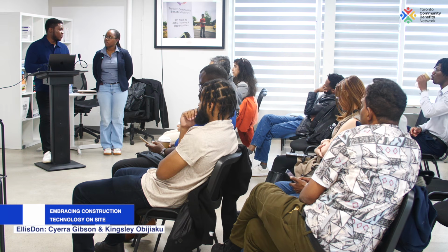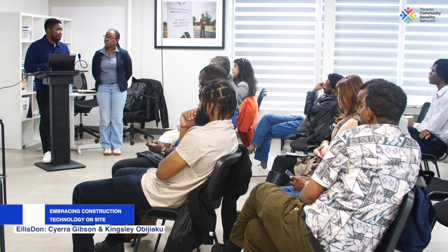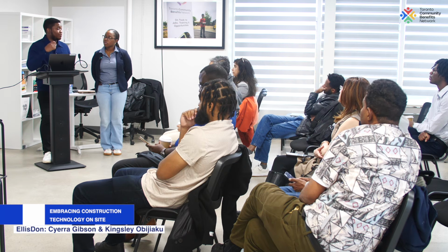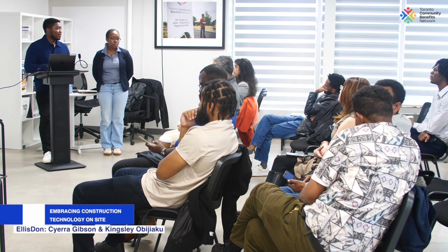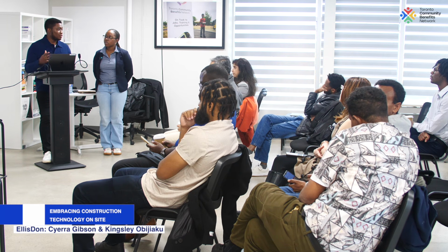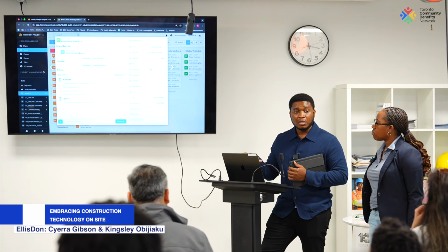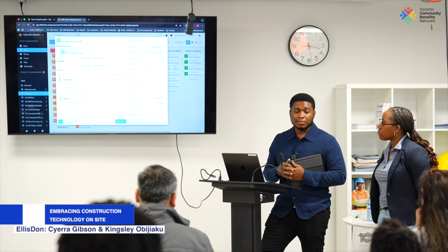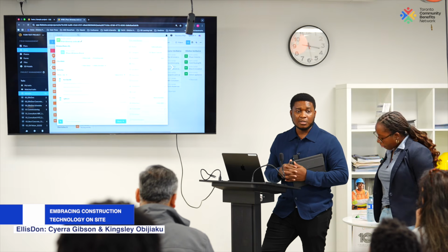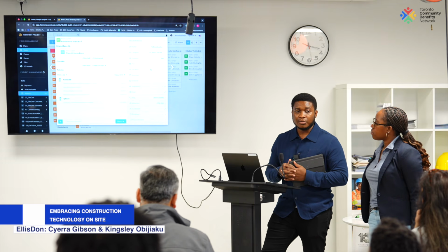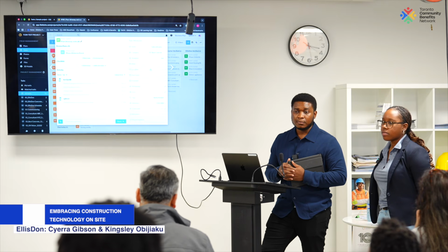And it's very important for us when we're finishing the job to also be able to generate as-built drawings to hand over to the owner. So that's what this tool can be used for. Because all the changes from the inception of the project are monitored here. So that's something that we need to be able to give the owner at the end of the job, a very accurate description of the project.